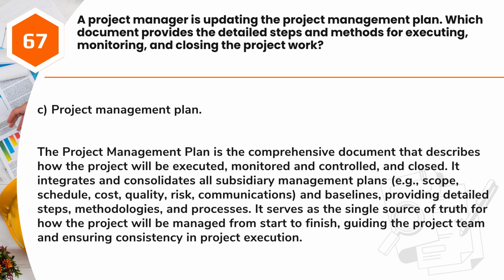Answer: C. Project Management Plan. The Project Management Plan is the comprehensive document that describes how the project will be executed, monitored and controlled, and closed. It integrates and consolidates all subsidiary management plans, e.g., scope, schedule, cost, quality, risk, communications, and baselines, providing detailed